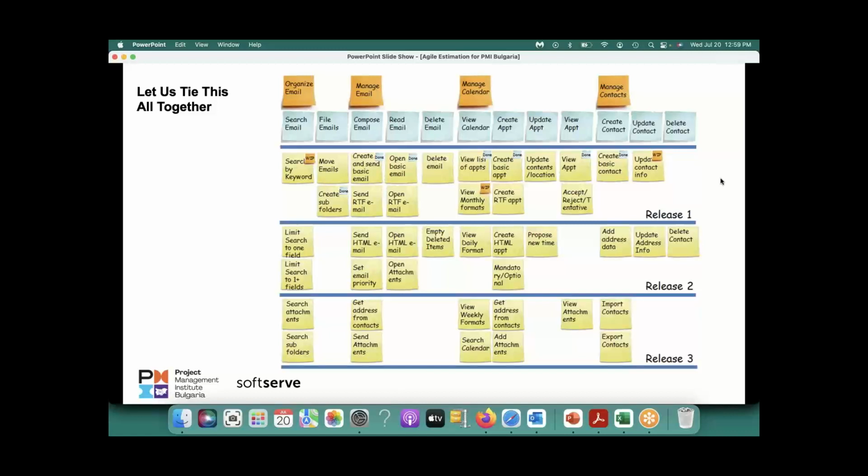So these blue stickies here, you can take that and say, okay, we will be able to finish this. This is the order, and we will be delivering this, and assume some team size. Okay, 5, 10, 6, whatever. Assuming this much cost, we can deliver this. Now he'll come back and say, okay, I can give you more money. Okay, if you give me more money, I can do this much more. So that is how this conversation needs to take place, and you need not even do release planning. That's where this 3 level of estimation is very helpful, to have a dialogue with the stakeholders and C-level people.